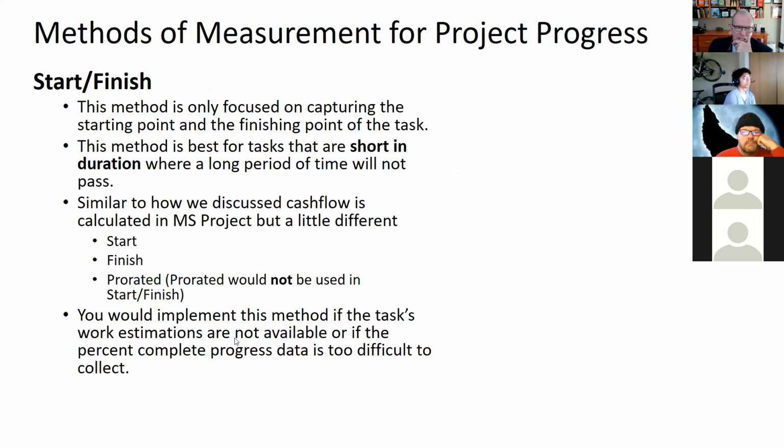Start and finish is more for payments. So it's not really going to help you for trying to figure out if you're over budget or under budget. This is more for when you're going to get paid for something, and it would tie to your contract.